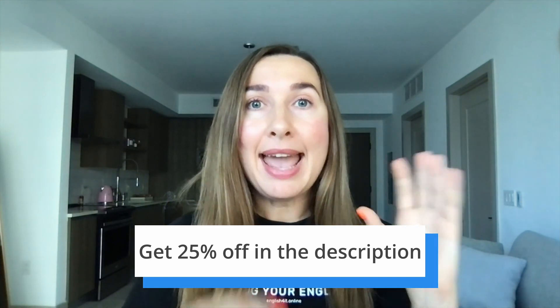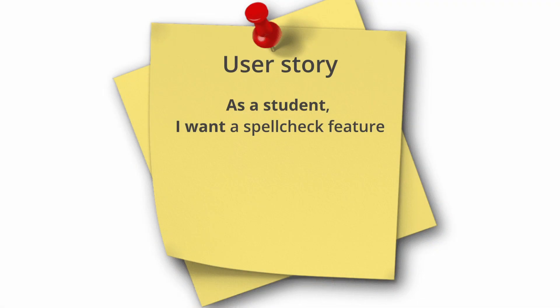So number one, we say 'as a who' — as an admin, as a student, as a project manager. Number two, say 'I want what.' What is the functionality? What is the goal of this functionality? What do you want it to do for the persona? On the learning platform, you want to have a spell check feature so that you can write grammatically correct.